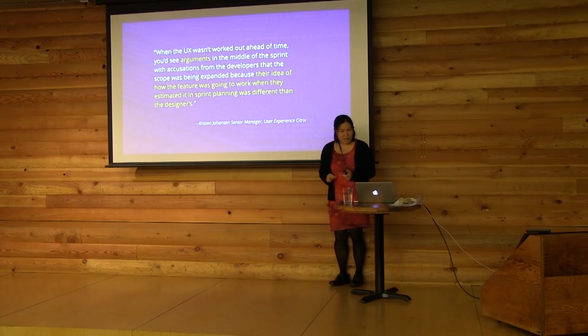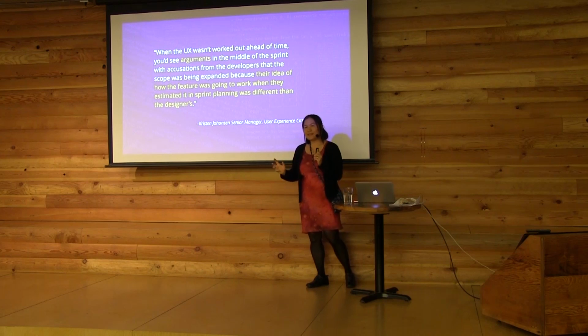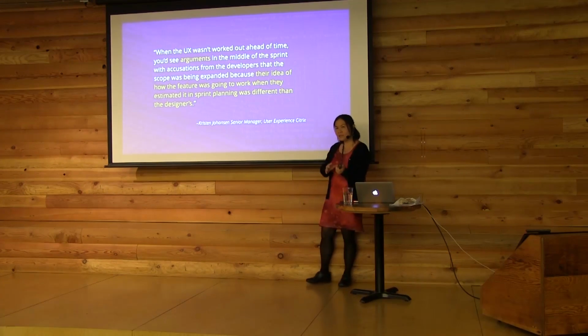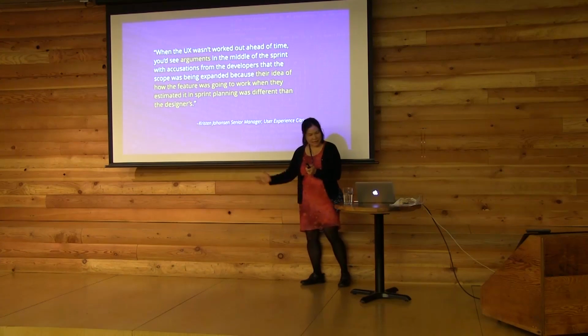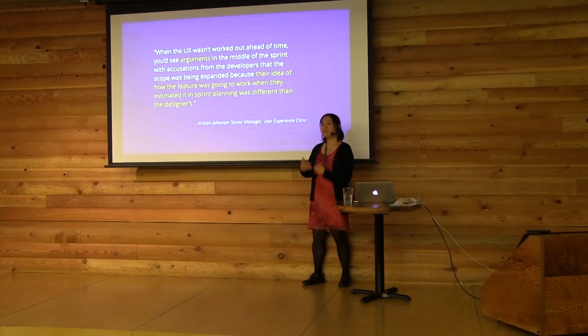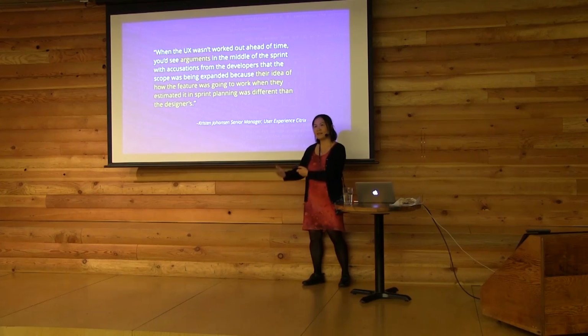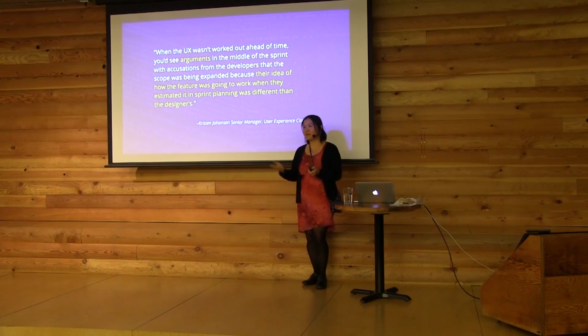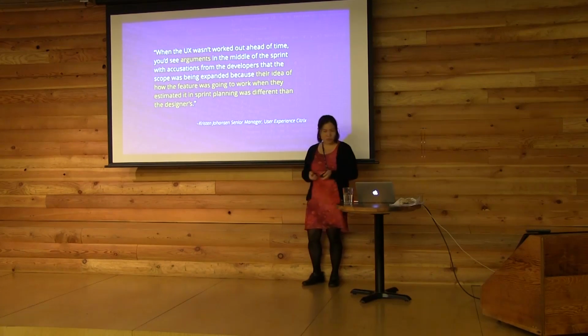And this is just kind of maddening, but every experienced designer has seen this, which is that you estimate before you design, and then you create those timelines based on those estimates, and then when the designer comes up with a better solution, you can't even consider implementing that designer's more expensive solution because you've already committed to a timeline, okay? And then either the design is ignored or the designer is asked to refactor it into something cheaper, which the designer's not happy with, or developers put in overtime and the team gets unhappy.